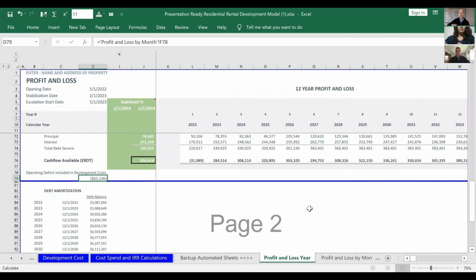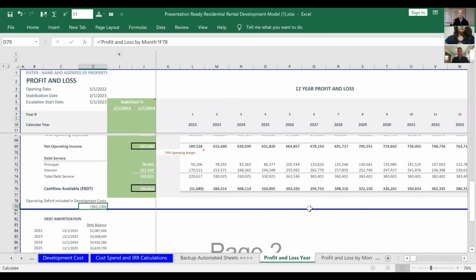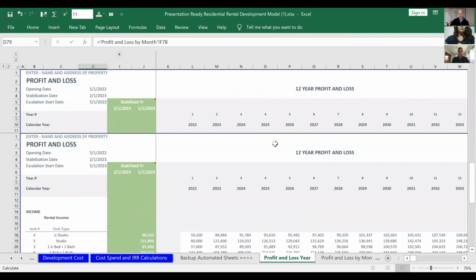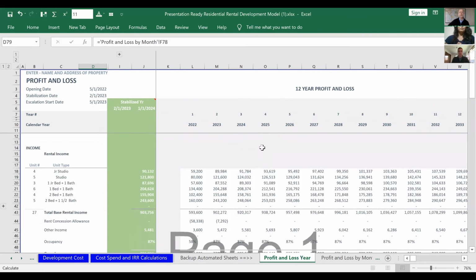So they're not going to just give you X amount of dollars each month. They might say, send me your updated costs, and then they're going to allocate as you go along. A lot of people think they're going to get a lot of money front loaded here. And the lenders, especially right now, are drilling down into the details on a lot of these. So that's a great tool right there. Even in big corporations, it doesn't matter if you're small or even REITs, they would have to do specific draws and show exactly what you've spent and exactly what you want your money for. They're very tough out there.